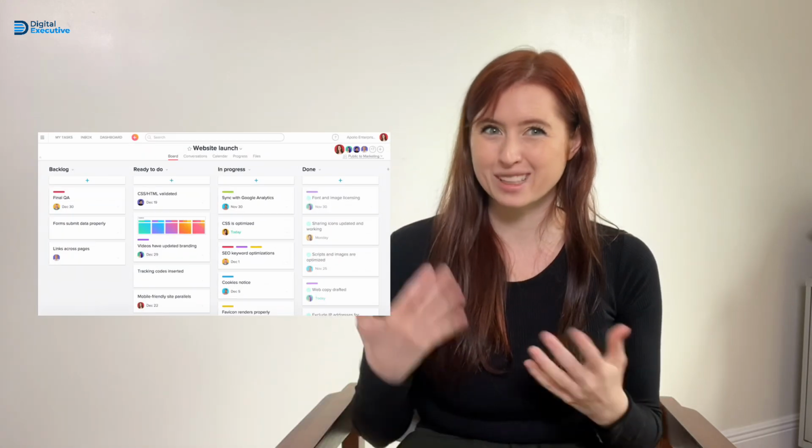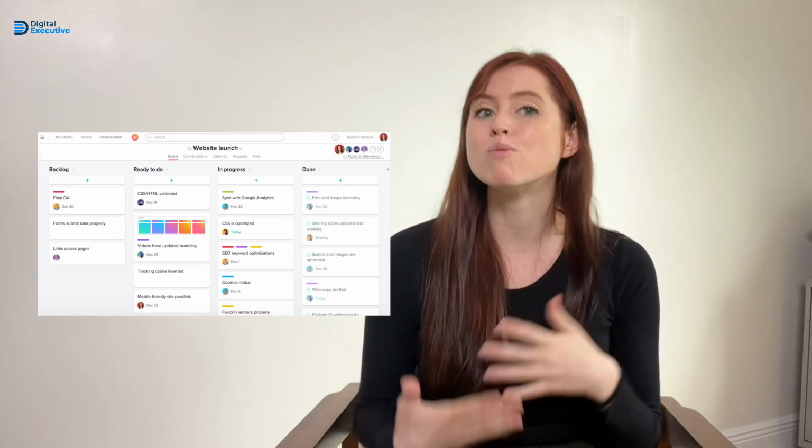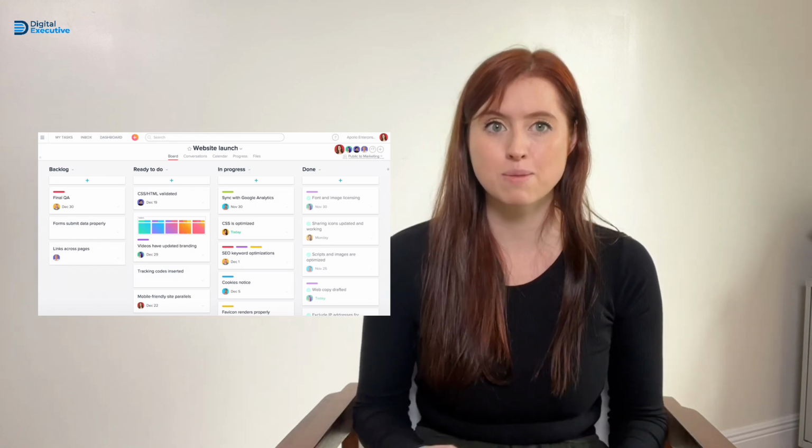So that brings us to the board, like I just mentioned. So the board is for multiple step projects. So for example, when you get out of a meeting and you create a few action items that have to be done in a sequence, those are all items that would go on the board. And the board should start with foundational items, mid-size items, and then finishing touches. And this board is also a great place to store any to-do items that are far in the future or require an approval process.